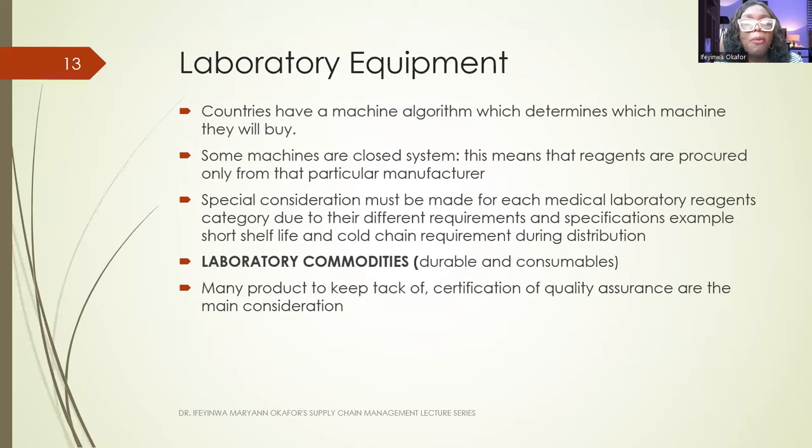Or in a situation where you have only one responsible source and no other supplier or services will satisfy agency requirements. In a situation where only that particular source is able to satisfy the agency requirement, it can be used as a single source.